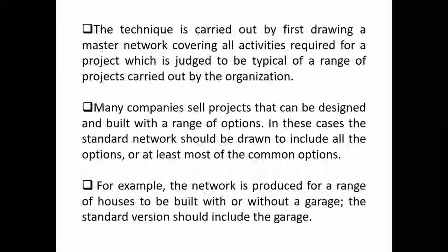in life. Right. So the technique is carried out by first drawing a master network covering all activities required for the project, which is judged to be typical of the range of projects carried out in the organization. Yes, many companies sell projects that can be designed and built with a range of options. In these cases, the standard network should be drawn to include all the options, at least most of the common options. For example, the network is produced for a range of houses to be built with or without a garage.